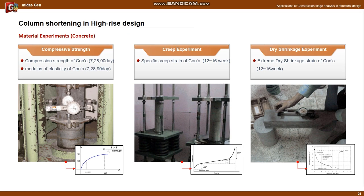The following is how to conduct material experiments. A compressive strength test is performed to obtain the compressive strength and modulus of elasticity for cylinders at 7 days, 28 days, and 90 days of age. In the creep experiment, the specific creep strain curve is obtained from 12 to 16 weeks through experiment. In the drying shrinkage experiment, an extreme shrinkage strain curve of about 12 to 16 weeks is obtained. These values should be reflected in the secondary construction stage analysis.